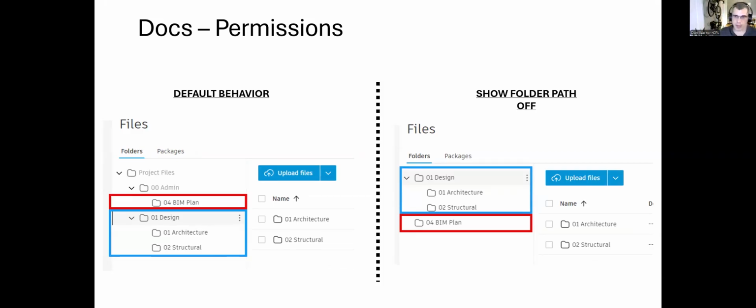Let me explain how we do it, and I will explain how I did it at my previous firm. Because we have engineering in-house, we just use the term engineer. We don't use mechanical engineer, structural engineer, plumbing engineer, electrical engineer. We don't subdivide engineering. You can totally set up your permissions so that when somebody's added to the project, you assign them the role that matches the folder they should be working in. So I have a team that's electrical engineer. I add Sparky the engineer to that project. I give him the electrical engineering role. Now he can work in the electrical engineering world, but he can't work in anyone else's folder, if that makes sense.